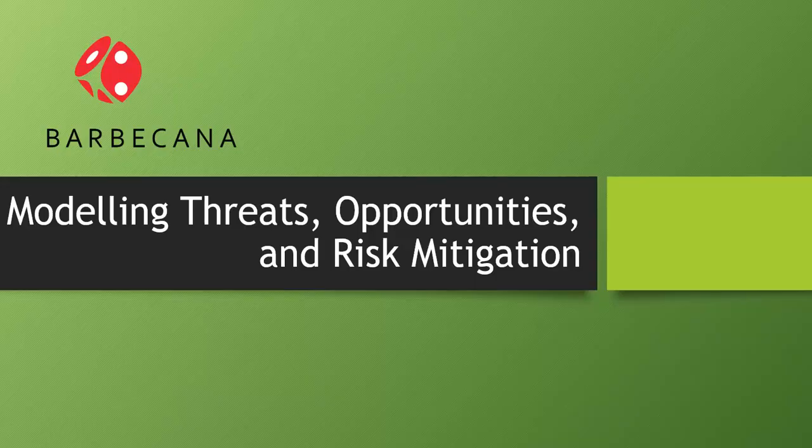So far in this video, we have focused on modeling duration uncertainty. However, Full Monte can also model discrete risks or threats and risk mitigation using several techniques including task existence, probabilistic branching, and conditional branching. Task existence is used to model simple threats that can be represented by a single task. Probabilistic branching can be used to model more complex threats or opportunities, and conditional branching is most often used to model risk mitigation.